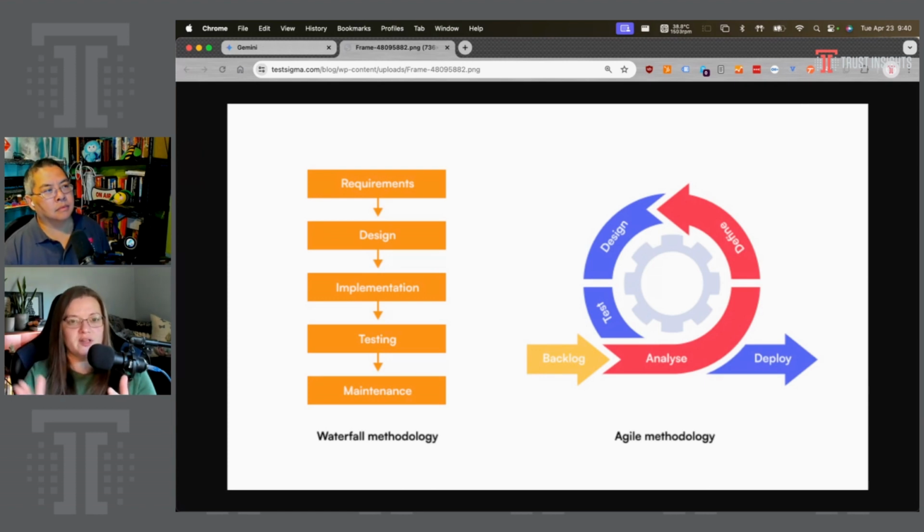And while you're doing those, as they start to move through the different phases, once the people responsible for doing the requirements for those have passed them off to design, then they can continue to move on to the other set of requirements. So basically, you have a lot of things running in parallel, creating this iterative loop where by the time you have something developed and ready to show, you can then go back and start working on the next set of things.